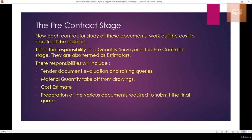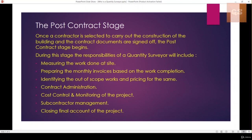Finally, you prepare all these documents as per the tender. The tender specifies what documents are required to submit to the owner so they can evaluate your offer accordingly, and you submit with your final quote. In the post-contract stage, once you are awarded the project — selected as the contractor to carry out the work — you sign all the contract documents, and the post-contract stage begins.